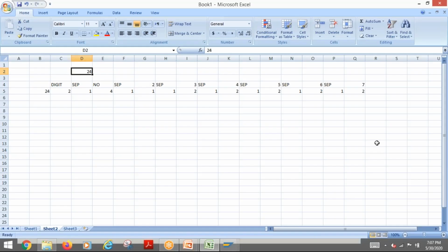So our maximum will be 24. Then how many maximum levels you require, you need to discuss with the project team. What is the maximum level they want? You can create further levels, there is no problem, but from the numbering you will not be able to identify which level this WBS belongs to. For example, I can create a level 8 with the same number, no issue. Similar to 7, I can create the next level. There is not an issue. But the problem is by looking at the numbering, because that is the reason for this external number, no? By looking at the numbering, you should be able to know which level this belongs to. So this is the logic you need to follow.